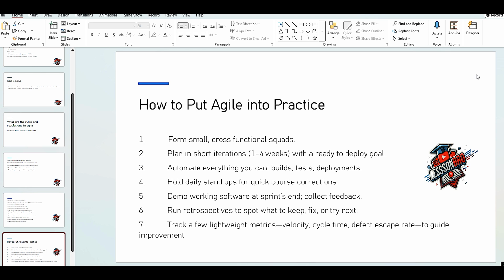The best practice in real time is that the team has to be small. I've seen Agile teams being 20-25 people, and I've seen even 10-20 people also. That's a challenge, depending upon the organization culture and the agreement between the customers and the client. But it should be small and it should be functional squads. That means there should be a tester, a designer if needed, a BA if needed, and a good amount of developers. In real time we need at least 9 to 10 people to have a successful team.